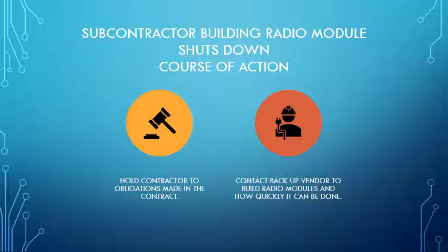We were able to secure an order with our backup vendor, but incurred an additional cost. Because we had a backup plan and vendor already scouted, we were able to keep the project on schedule, but had to combine activities that could be done at the same time to ensure this delay did not affect the company's commitments to their customer.